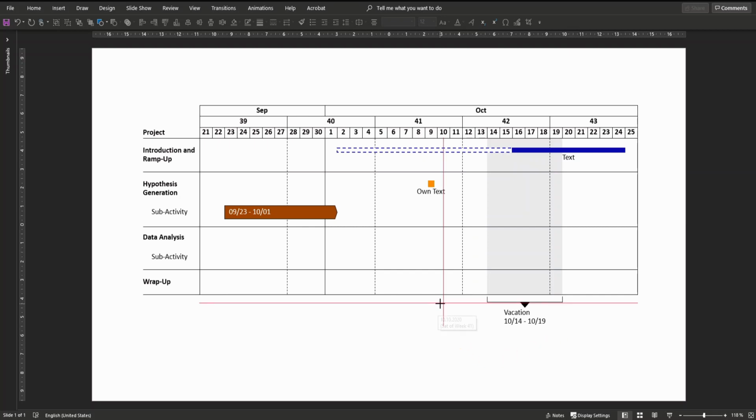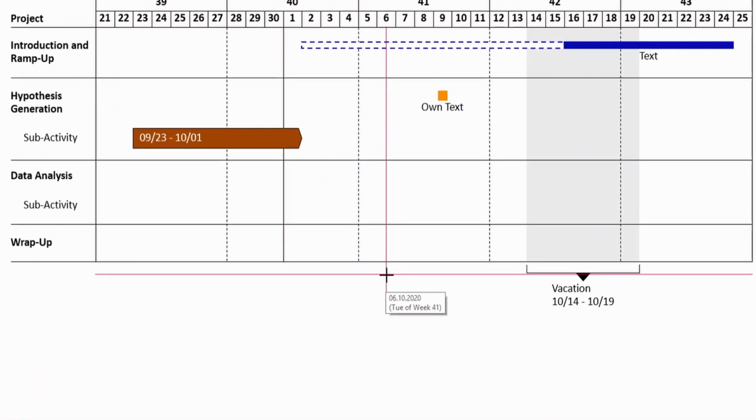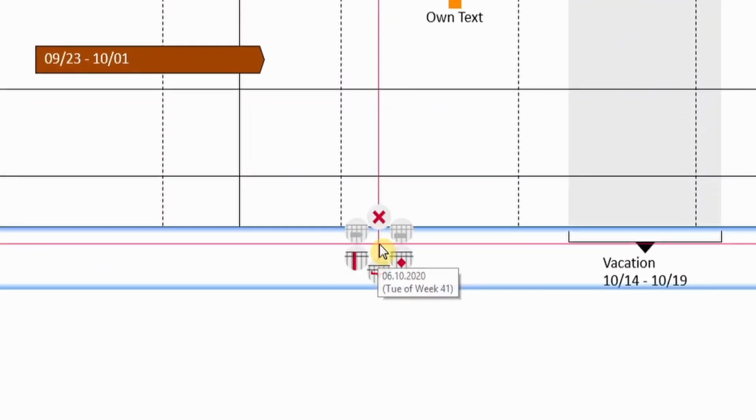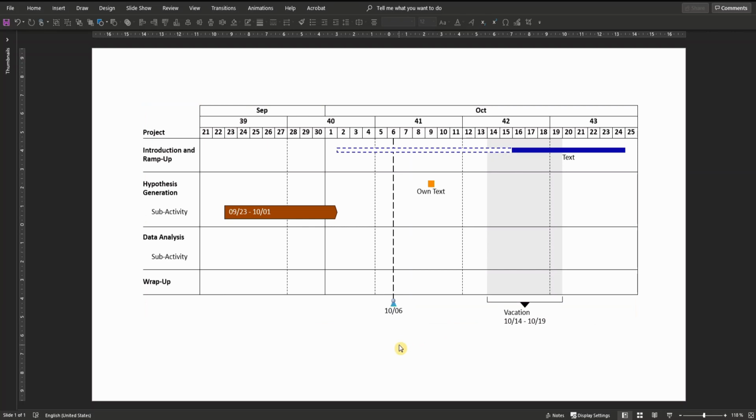Similarly, you can also use milestones here at the very bottom below the Gantt chart to indicate overall project milestones or events. Just right-click and insert again a new milestone. And since it is an overall milestone below the overall project, such a dashed line is automatically inserted that connects the milestone with the date on which it actually happens.